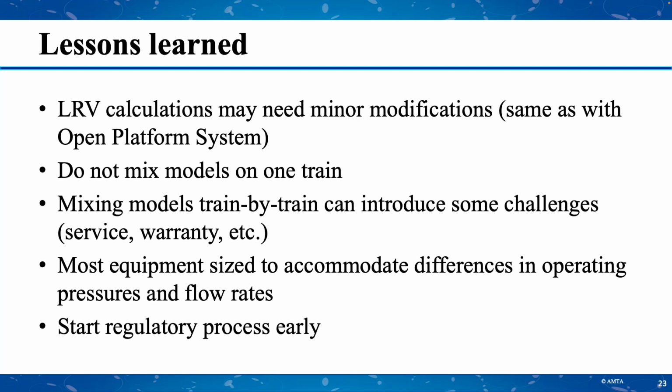So you need to keep in mind that you may need service on both the old and the new, and warranty is also a consideration, making sure that your warranty is not impacted, those sorts of things. So generally speaking, so far it seems that it's easier to replace everything instead of going train by train, do all the modules basically at one time. Not to say that you can't handle it the other way, but it does bring a few more challenges.